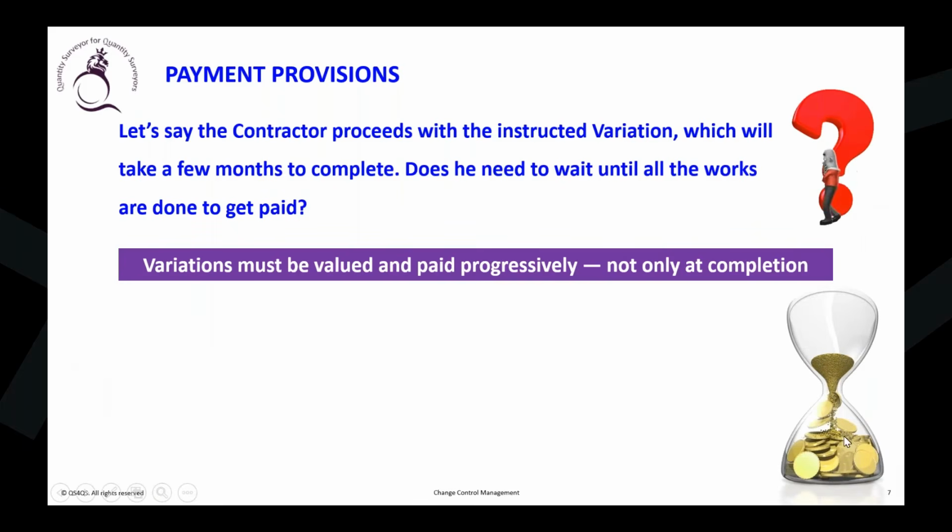Because you have to think about the time and the money. It's time and the money together. Now, you should know how to value the variation as per your contract. Maybe you can go for the BOQ rates or new rates or day works or any fair quantum meruit basis evaluation. Maybe in some practical way you can calculate based on the productivity. You should know how to value the variation. Many construction practitioners are fighting in real projects without knowing how to value the variations.